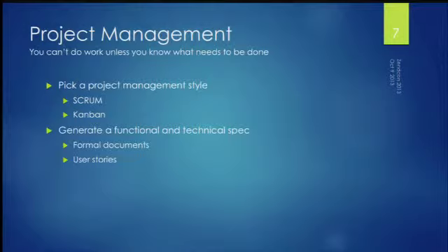Once you've got a project management style, see how they want you to design your specs. A lot of them have you do user stories, which can be little one-liner things, or it could be a full, little narrative that tells you how your site's supposed to work. Some of them, if you use things like waterfall or big design up front, you have to build formal documents. But get those specifications in place so you know what kind of work you need to do. And stick with it.